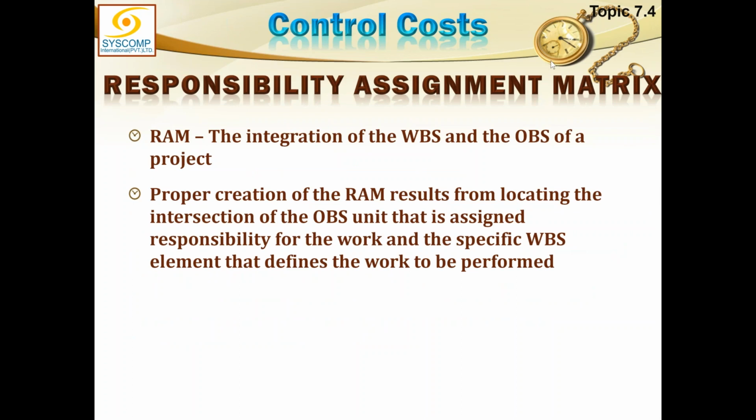Then you should also be aware of another terminology, which is called the responsibility assignment matrix. We'll be using it in the resource management chapter. The responsibility assignment matrix is the integration of the work breakdown structure and the organizational breakdown structure. I hope you understand the organizational structure, the hierarchy, how the people are set up.